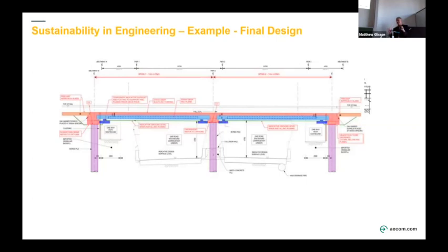That particular project has a very focused sustainability management protocol attached to it. They actually review every structure on the job to see if they can make it more cost effective for the client. But the client has challenged them to have at least a 20% carbon reduction from the baseline. And this was what they came up with. They spent something like, what's that in euros, about 10,000 euros in additional GI, which meant they could rationalize the foundation design. They could have reduced the number of piers because they had higher bearing capacity, but lower diameter piles. Kimberly, you can tell us how they managed that.